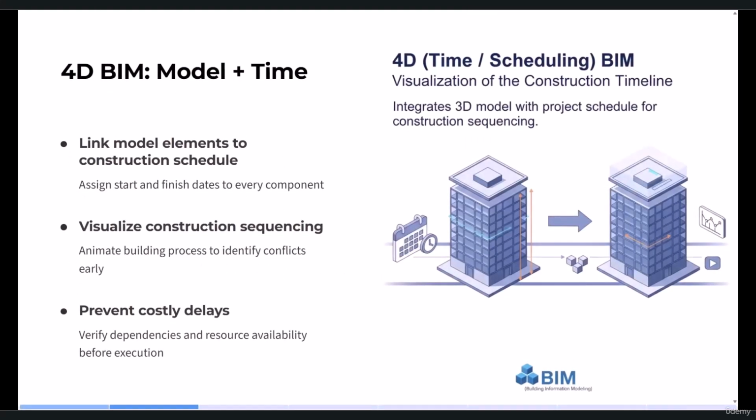So fourth, I mean BIM, I mean model plus time or schedule. That is, construction during the time will be completely visible. So in traditional projects, the schedule was done based on MSP, and the 3D modeling was done by Revit or Navisworks. So actually, the model and schedule were separated from each other. I mean, if the schedule was changed, the model was not updated, and vice versa. Opposite of that, if the model was changed, the schedule was not informed.